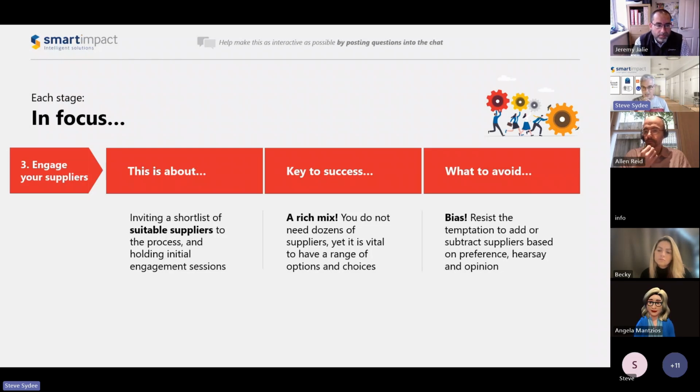Yeah, so look, firstly, don't forget what Alan said at the top of the webinar, right? For every single provider you engage with, if you're really going to engage properly, you need to expect to spend 2 days per person involved in the process. So you want to be realistic. I think my advice is aim for a short list. So undertake market discovery. There's quite a lot of things that you can do to do that.